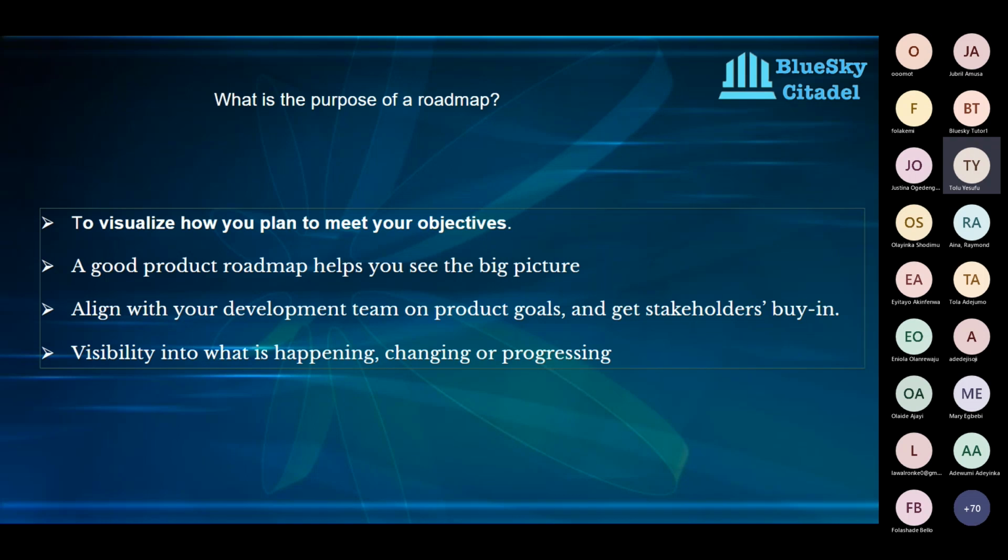Because if you have a milestone in place, if you have a plan in place to say, by the end of February, this is what we would want to have achieved, and you're moving close to the end of February, and you already can see that there's a risk to us actually delivering within that time frame, then you want to start understanding what the delay to that progress is. And the roadmap helps to do that as well.